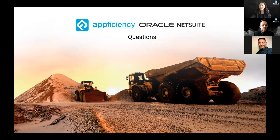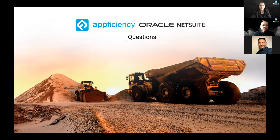The first question: we've had situations where we've had to terminate our contract with a subcontractor and hire someone else to complete the job — can the system handle that? Absolutely. In the NetSuite-Efficiency solution, you can close out your PO, which immediately drops any further balance from going onto your committed costs in job cost reporting. Then you can open a new PO for your new sub who's going to take over the work or the new material order. Sometimes people are afraid to close POs after they've been partially vendor-invoiced, but from a NetSuite-Efficiency perspective it's a very simple process.